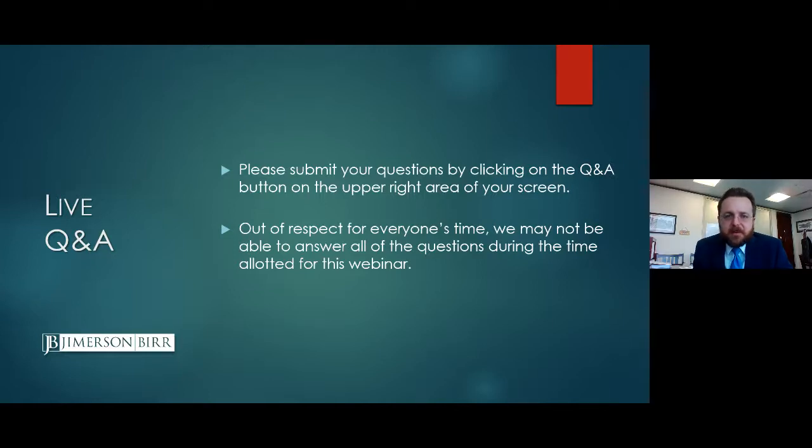Ryan gave an example about the Perini case. Is a $600,000 profit enough to take on a $14 million risk? So how do you assess the risk? Well, you look at the contract terms, of course. Does it have broad form indemnity that makes you the insurance company of the general contractor? Does it have waiver of consequential damages?